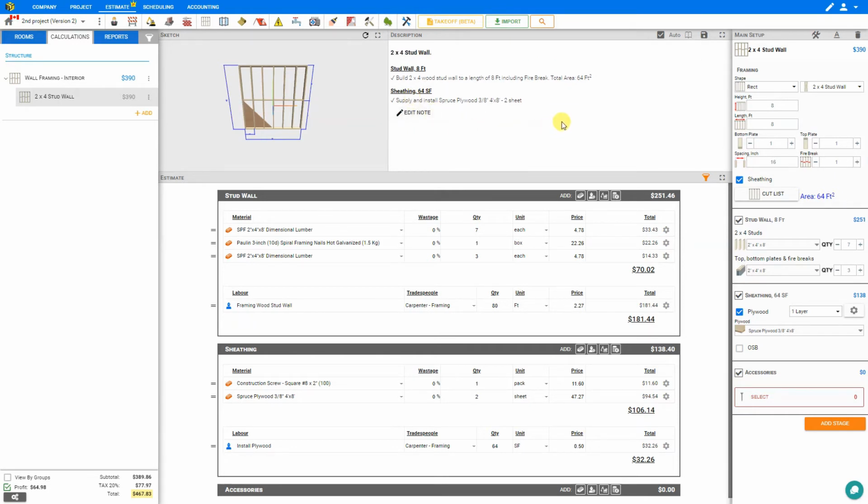And if at any point you want to turn the automatic descriptions off so that this description no longer is automatically responding to your inputs here on the right, you can deselect auto here. And now you can just select the specific note and freeform type whatever you want. When you turn the auto descriptions back on again, however, PriceAJob will not recall your overridden values as it will revert back to fully automatic. So if you have anything to input manually here, you should only deselect the auto descriptions at the very last step. And lastly here we have the third pane here called Estimates.